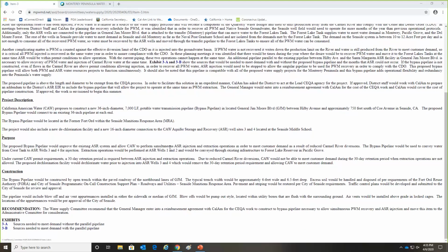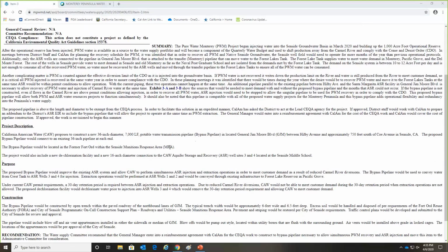This is Director Evans. I have a question. What is the timeline for this? Assuming that this does get approval here and it goes before the board, what would the timeline be for doing the CEQA work and then to design and do the construction? John, our goal, we talked through this with John, is to be able to accomplish this before the next rainy season. So we would like to have this constructed by the second half of this year.